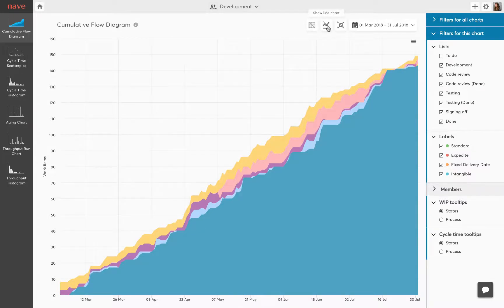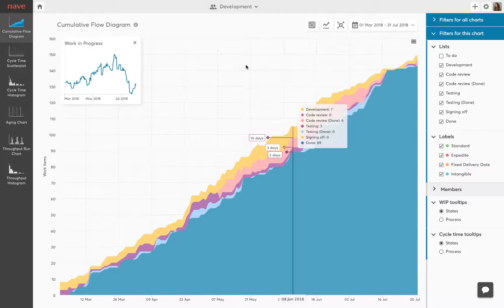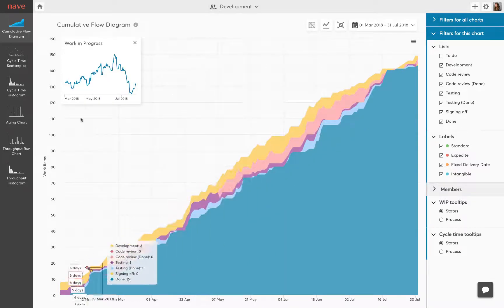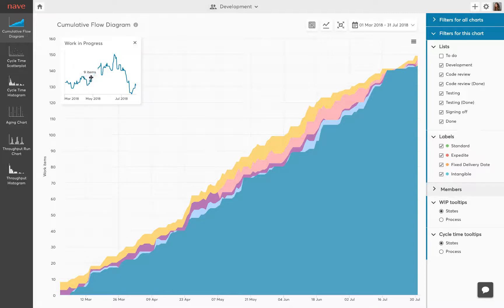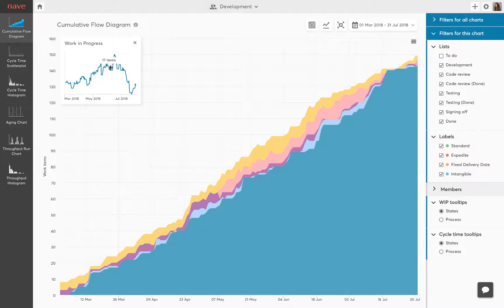You can monitor how work in progress trends build over time using the advanced work in progress chart overlay. It shows the number of tasks in progress for each day in the selected timeframe. Ideally, the line should stay even or go down. If the line goes up, this means work in progress goes up and your team is working on more tasks than they are able to handle.